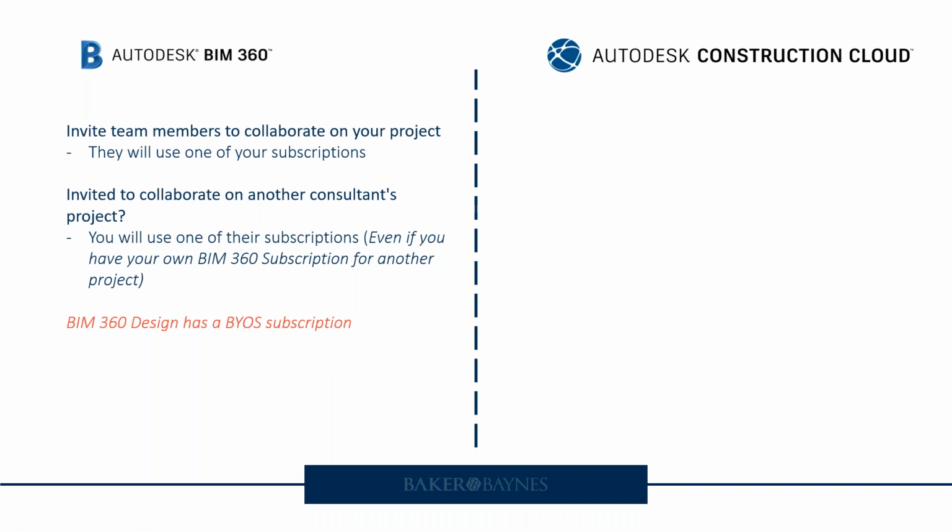So if you invite someone on BIM 360 Docs to join your project, they are using one of your subscriptions. And if you are invited to another consultant's project, which I think some of you had also voted for in the poll, you will use one of their subscriptions. Even if you have your own, if you are invited to their project, you will use one of their subscription offers.